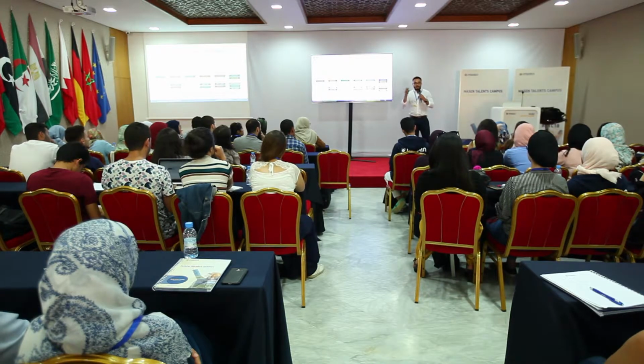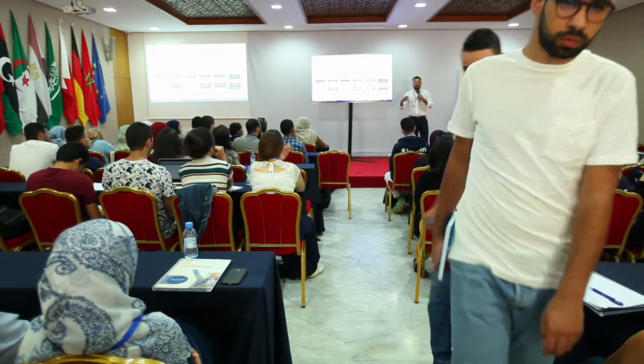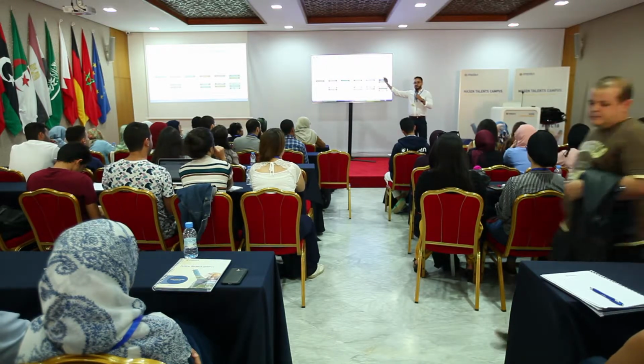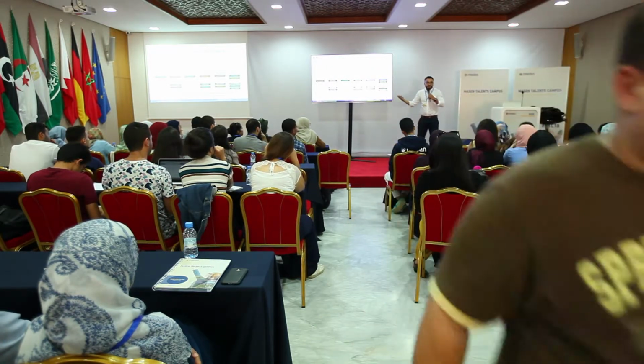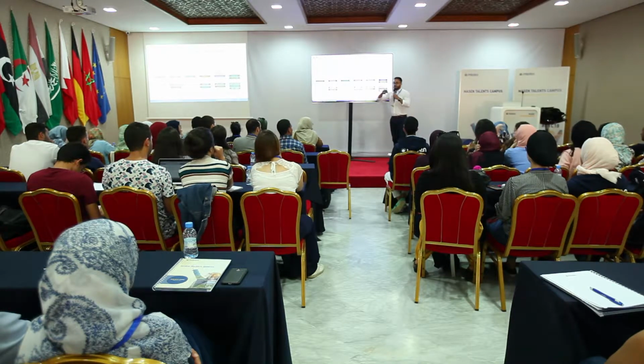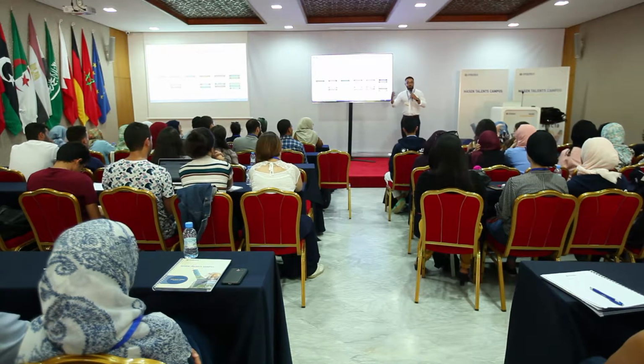So let's start, if you get a project, you start construction. So construction, final engineering, getting all the equipment, the civil work constructions, the commissioning, which is making sure that the plant, already in the last stage, starts performing as it should. So the heliostats are doing what they're supposed to do. The receiver is working as it's supposed to.